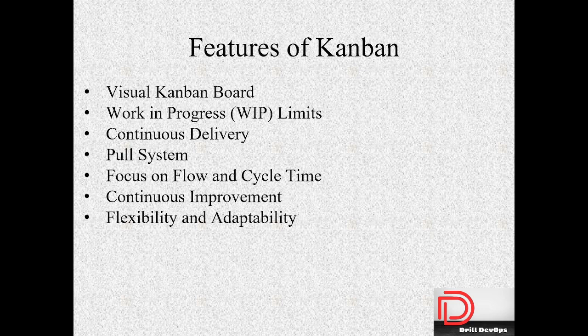So like that, I can put limitations on work in progress tickets, and it basically constitutes continuous delivery, where Kanban mainly promotes the continuous flow of work and allows the team to get the deliverables done as soon as they are completed, instead of waiting for entire things to be done.